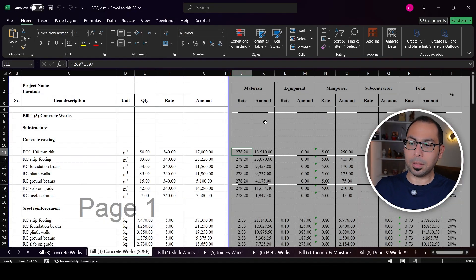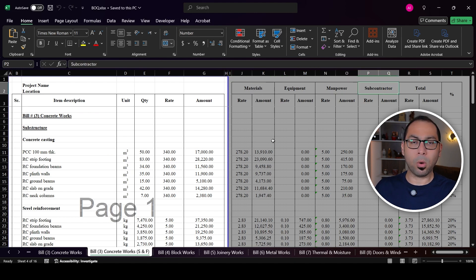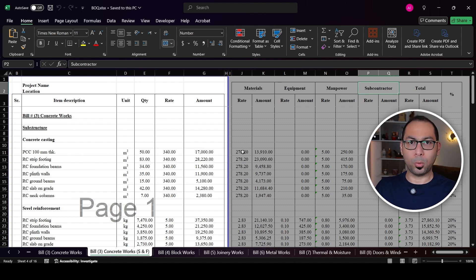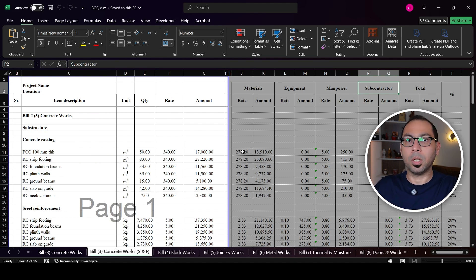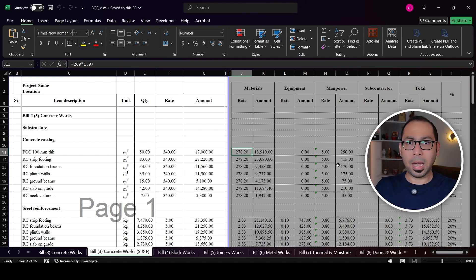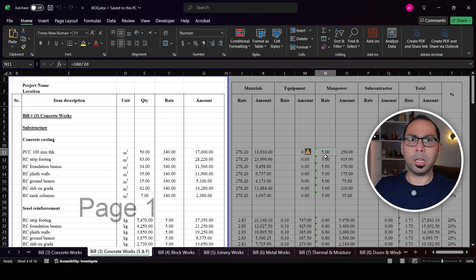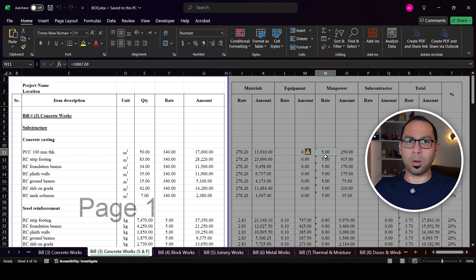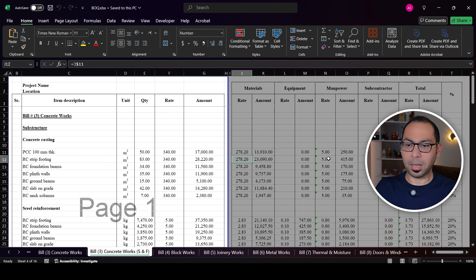When estimating, my cost estimation template is split into materials, equipment, manpower, and subcontractor. For concrete casting, under materials I put the rate for supplying concrete in cubic meters — no problem there, because concrete suppliers sell concrete in cubic meters. For manpower, it is easy to calculate how many cubic meters of concrete one laborer can cast per day.